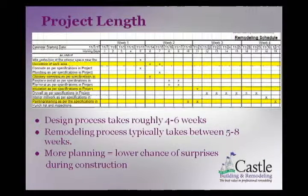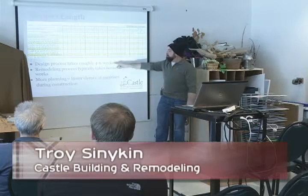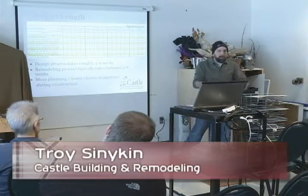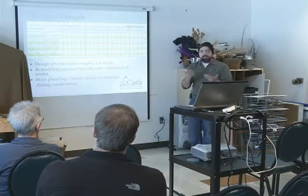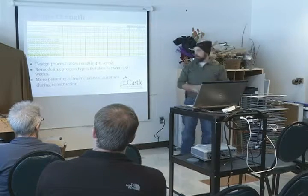Here's a good idea of when we're working: design process 4 to 6 weeks, remodeling process 5 to 8 in a basement, that isn't unrealistic. We are about 10 to 15% faster because of the time we put into this design. I'll have people call me and say, can I start your bath? I'm ready, I wanna start my bathroom next week. And it's like, the way we do things, it won't happen. So if you wanna find a guy who'll come in, start working on your bathroom a little at a time, figure it out as it goes, awesome, not the way we do it.